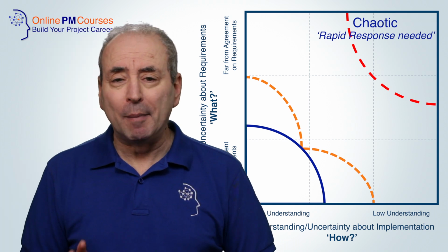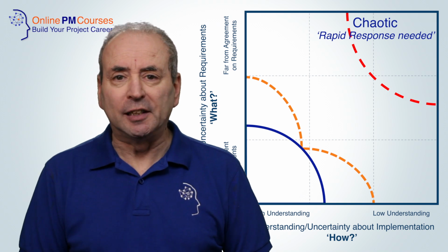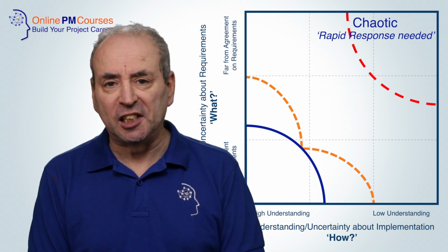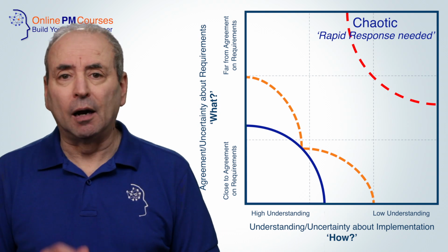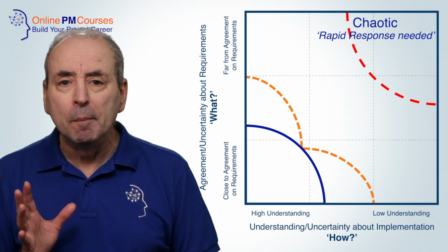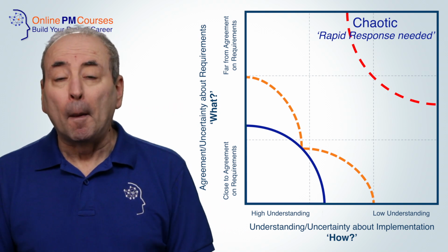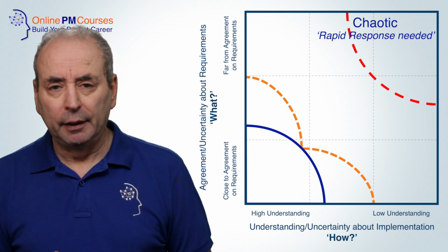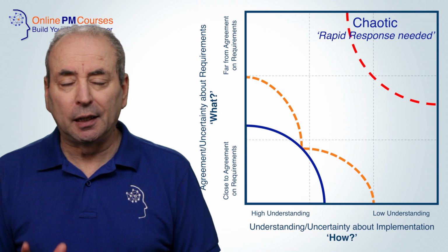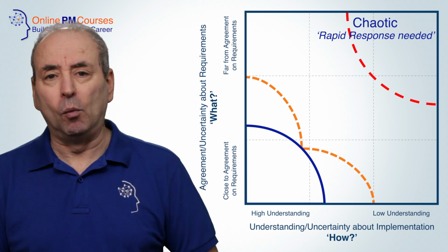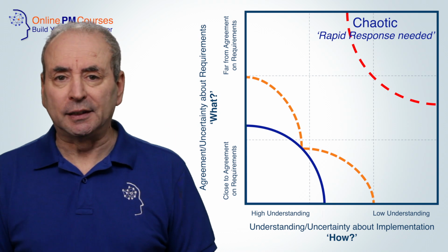So, look for project management methods that are well suited to constant short iterations and rapid review of what we've achieved. This calls for fully adaptive or agile approaches with little committed planning and rapid decision making. Because of the level of risk here, it's also well worth considering whether it is possible to split up or simplify the project in some way, or possibly whether it is worth the risk at all.